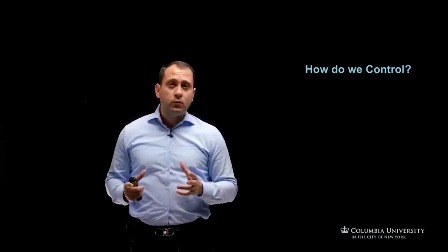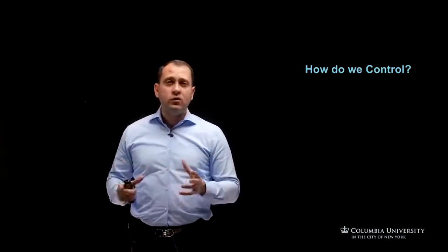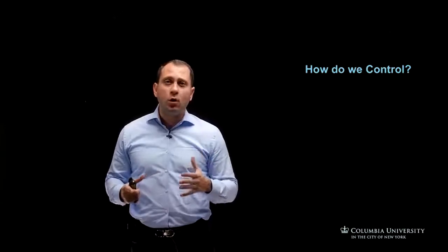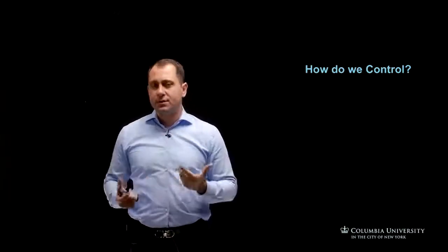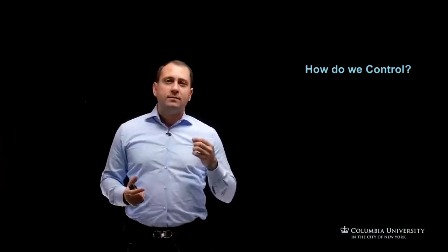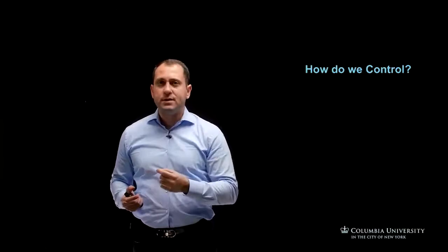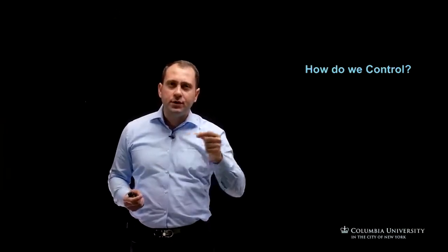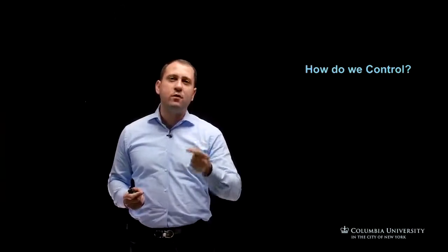Now, for the second type of control, we talked about the real-time control. The second type of control is trend control. It is based on forecasts of future performance measures. Actual values of the performance measures are extrapolated into the future in an effort to detect deviations before they occur.